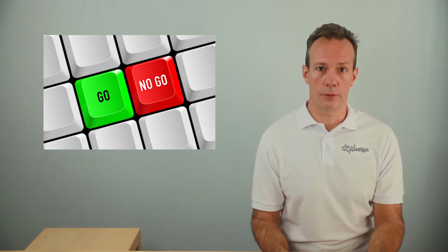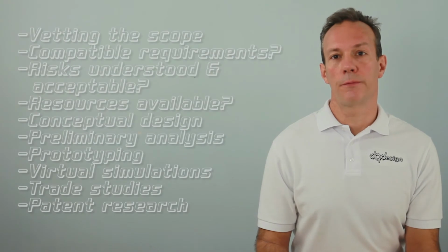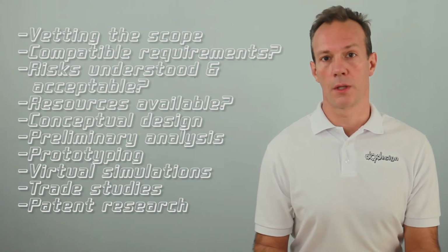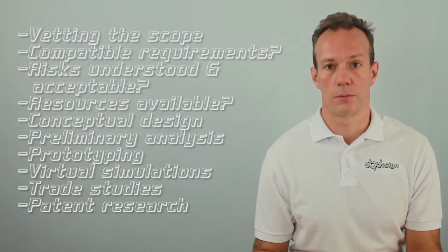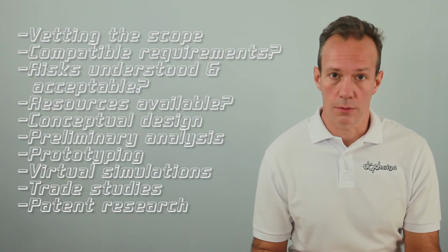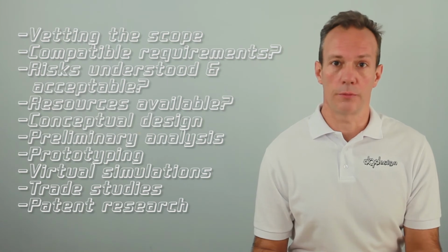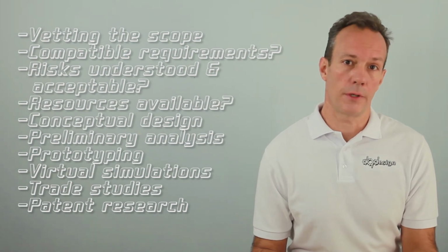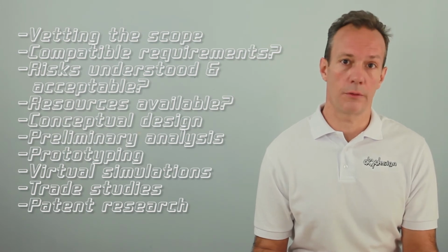Feasibility studies terminate sooner than a complete requirement definition study and focus on higher level matters such as budget, schedule, logistics, regulatory, etc. Engineering feasibility study considerations include vetting the scope and available documentation, and is the information adequate and accurate? Are there holes in the requirements prohibiting execution? Are the requirements compatible with each other? And are the risks fully understood and acceptable? Are the resources available? Funding, staff, technology, equipment, capabilities. It'll give you a conceptual design, a preliminary analysis, prototyping, virtual simulations, trade studies, and patent research.